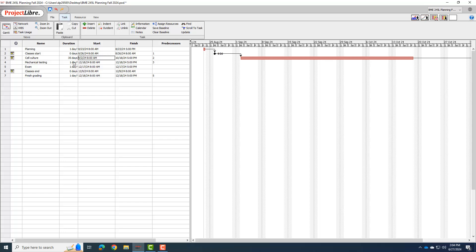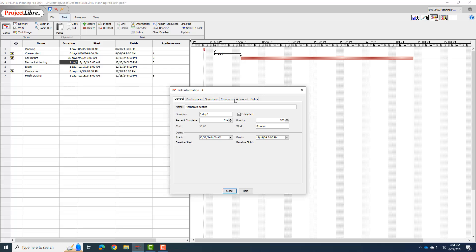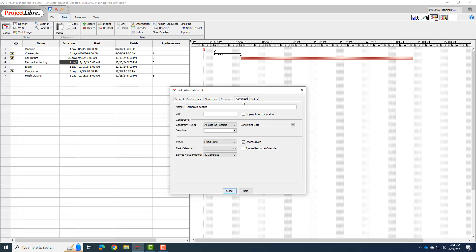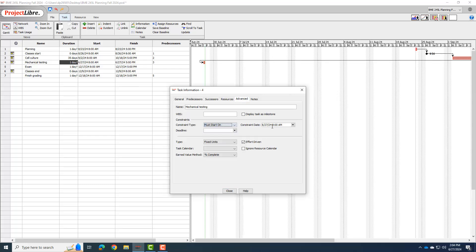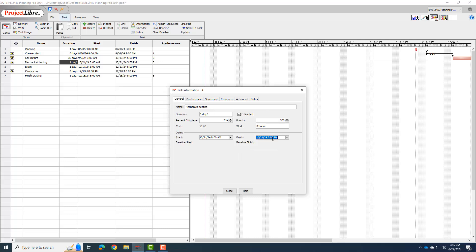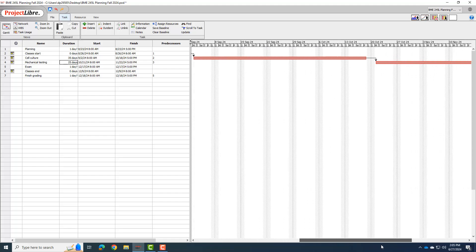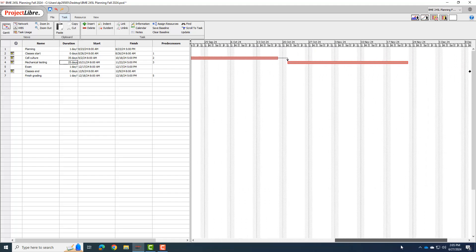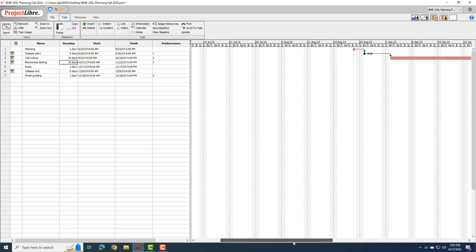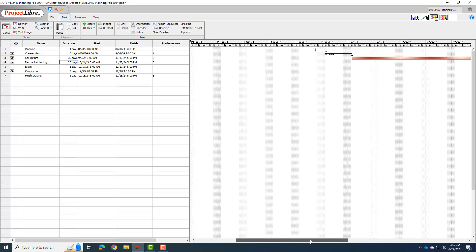The second major phase then is mechanical testing. I know mechanical testing is going from 10-21 to 11-22. So let me double click that to set that. So again, I'm going to advanced. I'm going to say must start on, and I'll put the must start on date is 10-21-2024. I can go to the general tab to set the final, which is 11-22-2024. And again, I'll uncheck the estimated so it doesn't have our question mark. Now we can look at this, and we can see those major phases are scheduled.